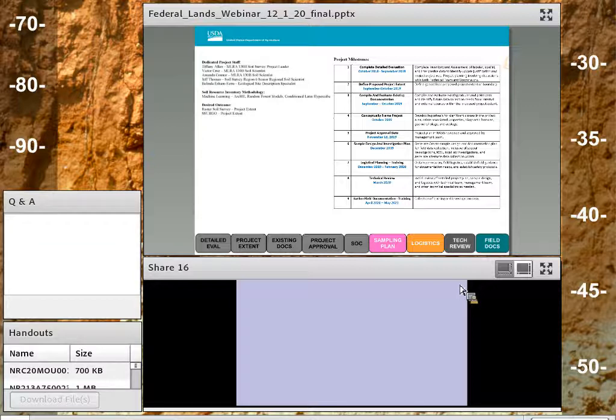And the other thing I want to emphasize here is the sample design and investigation plan. So as I said, as we move into the next generation of soil survey inventory, I think it's really important, especially when we're working with our federal lands, that we provide our cooperators a pretty sound sample design and investigation plan that lets them know exactly where we're going to be.